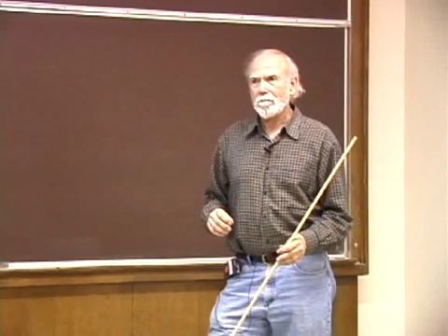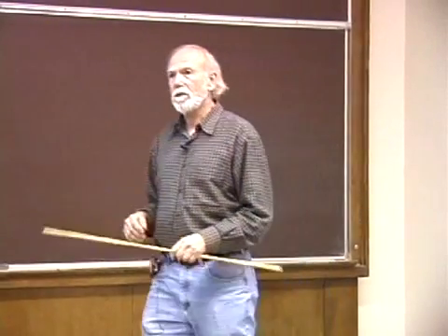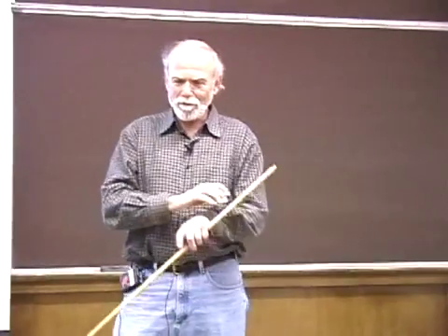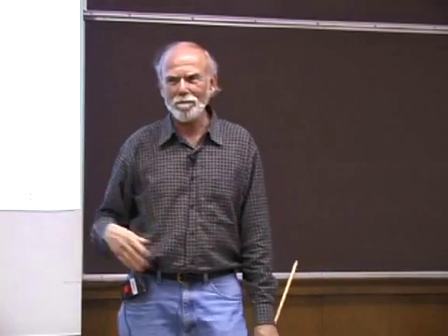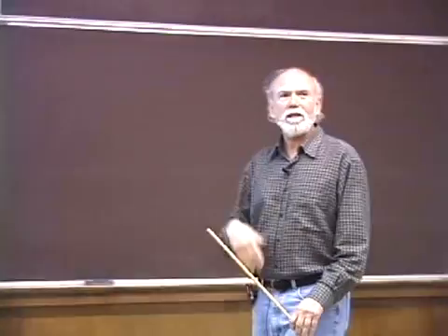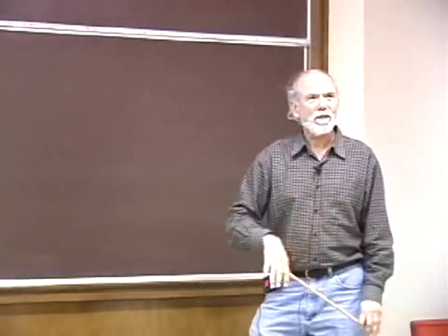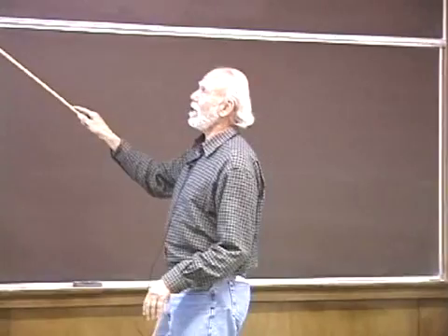This includes salaries, I presume? Yeah, it includes salaries, and you do it in today's dollars. So you do it all in today's dollars, then you estimate something about inflation in the budgeting. So then you end up with $250 million. Then what do you do to take care of the rest?